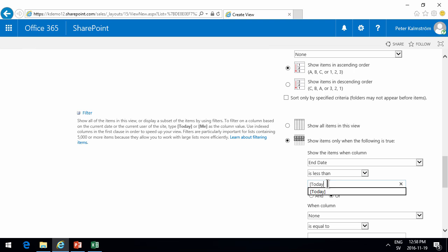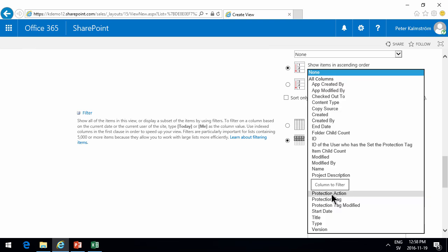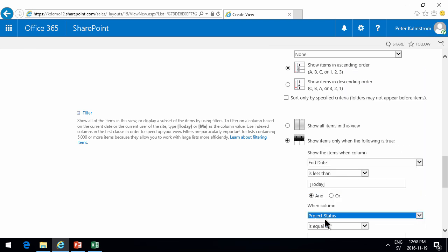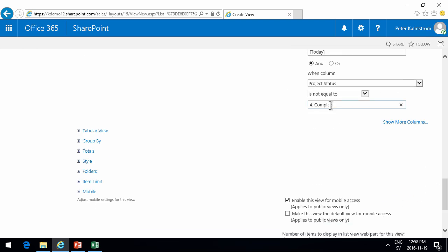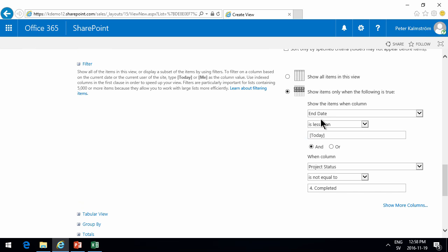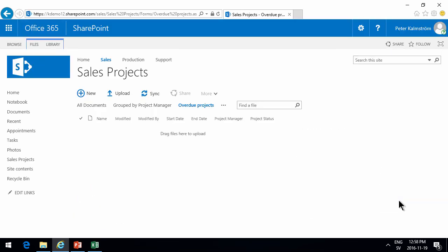And of course, where the project status is not equal to finished, because those are not overdue, right? That was number 4, completed. So that shows those that are late. End date is less than today, and the project status is not equal to completed. Okay, we don't have any of those, so let's change that.